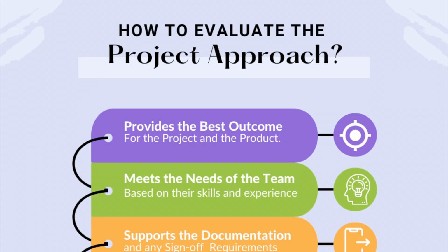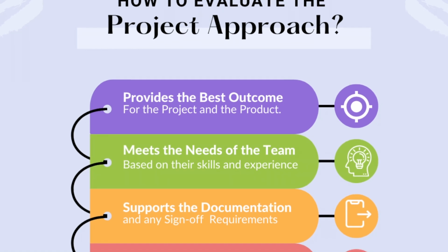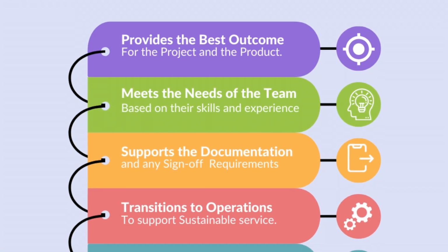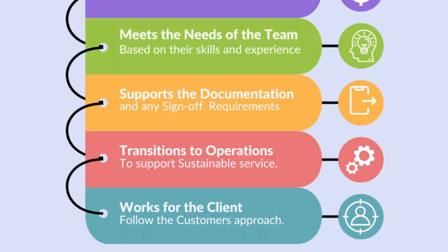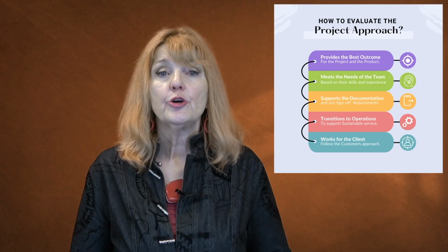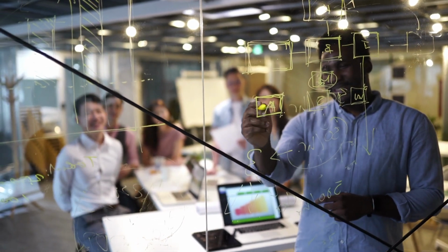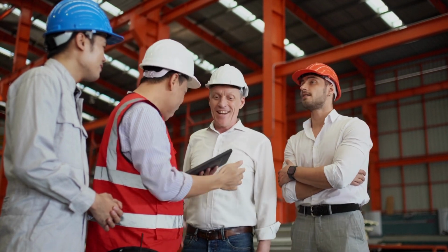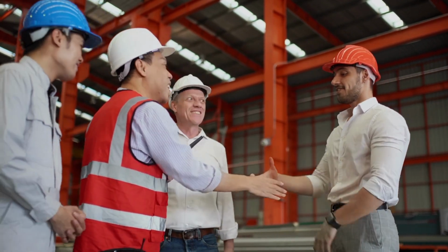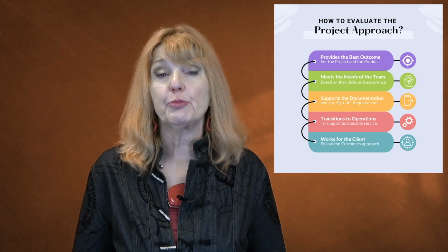Let's look at some of the key criteria for a method review and which method will provide the best solution: the best outcome which fits the product being created, which provides the least amount of total effort and limits the rework; the method that the team knows and is skilled in; the project approach which meets the project and product documentation and sign-off requirements; the approach which allows transition from completion to operations, and this will help create a sustainable and maintainable product; and the approach which is preferred by the client organization. Now that we have our evaluation list, let's look at how some of the popular and less used approaches stack